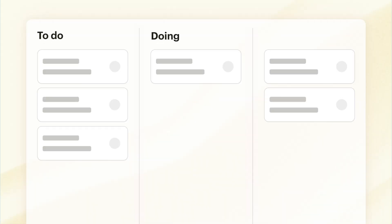Setting up a Kanban board could not be more simple. It consists of cards organised into columns, each in different phases of something like to do, doing, and done. As work progresses you just simply move these cards along those columns from left to right.